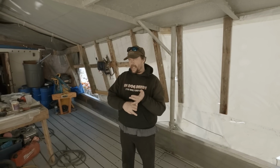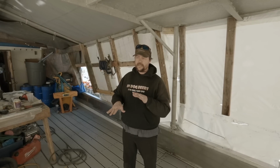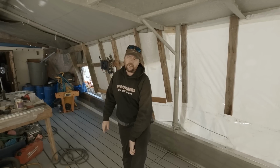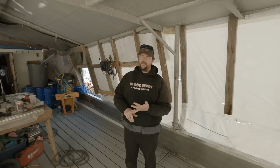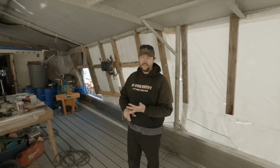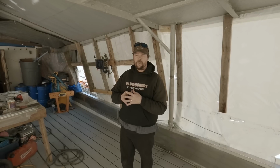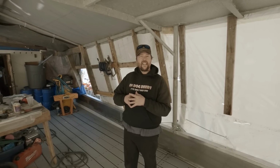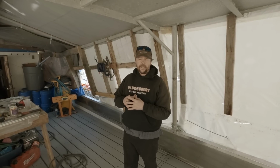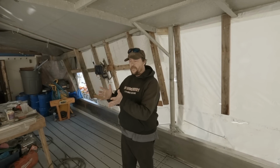Lead time is 8 to 12 weeks. We're hoping it's less. The seafood industry is kind of in turmoil right now. Ex-vessel prices for salmon and some of our ground fish are at historical lows, I would say. So we're hoping that there's not a huge demand for new RSW units right now. That's primarily what these guys build, that and freezer units. So hopefully they can get going on it right away, and we look at a shorter lead time, which will translate into earlier harvest.